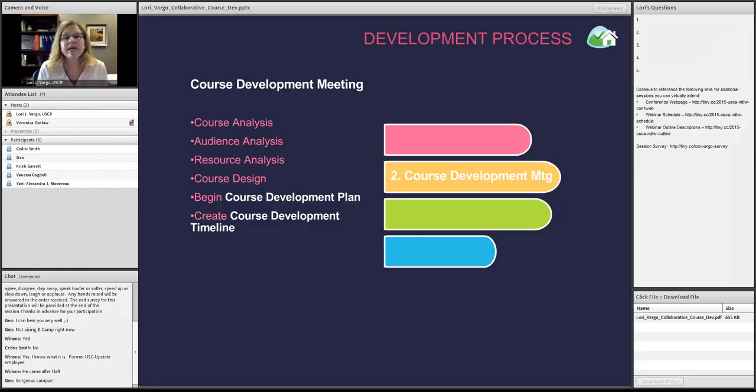It's the course development plan. All it is a chart in Word that has key parts for every module according to the Quality Matters rubric that they have to fill in. Before we begin any development, they have to have their course development plan done. Otherwise, things could run on forever. One tip is once something has been marked final, we don't want to change it. And I'll talk about that later, what happens when you have to go back.